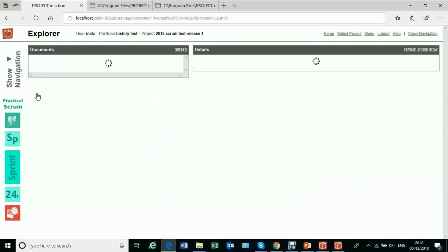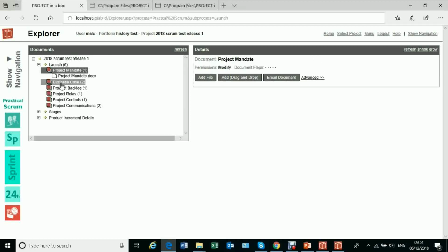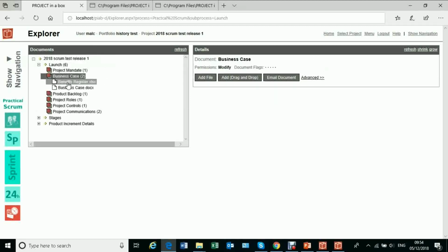So here we've got our launch process, which gets the project teams to do the stuff that puts it into a normal corporate sort of framework. So we've got a mandate. We're going to expect them to collect and record a mandate. We're going to build that out into a business case with some benefits analysis, and a demonstration of what the project's going to accomplish and why and for whom, etc. And that then starts to roll down into